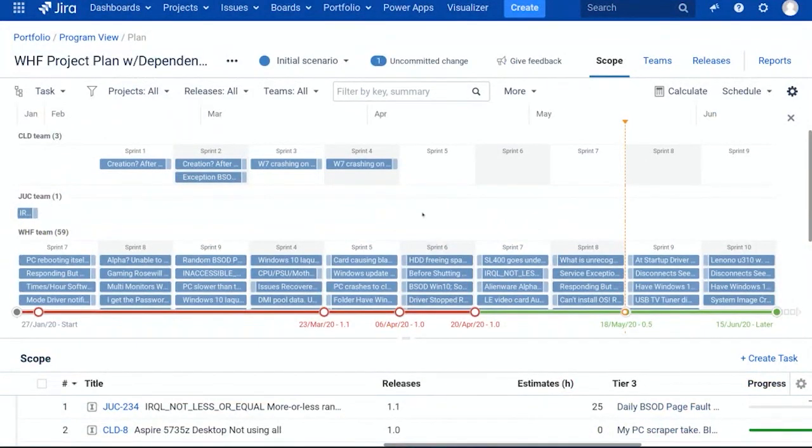If you've done any kind of planning with Atlassian's tools, you know that it was historically called Portfolio for Jira. Portfolio for Jira did two things. First of all, it allowed managers, product owners, or project managers to plan out activities across agile or non-agile teams. This would be a simple planning process where they can put issues like stories or tasks into a date range and then lay that out into a calendar plan that would show when those things are going to be done. That would be the primary, or what I like to call the more basic, functionality around Portfolio.